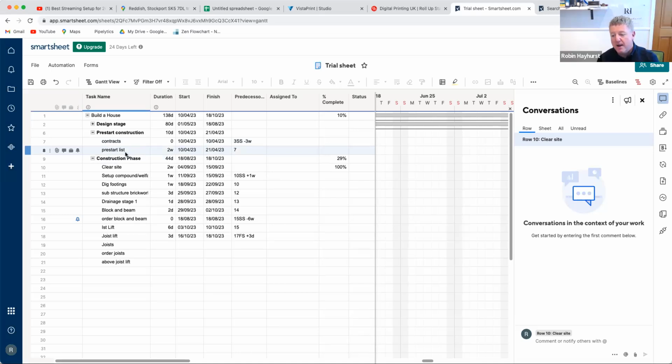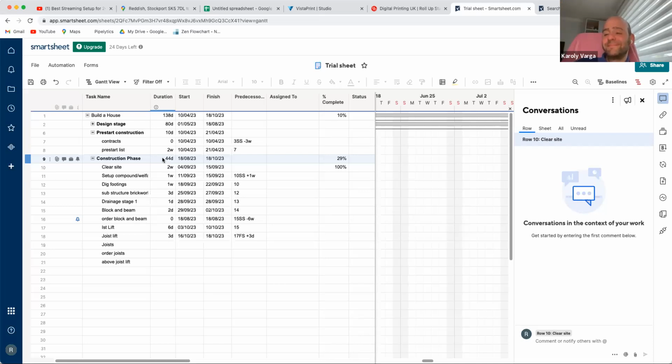This is a real bad thing that builders do: they phone an electrician and say, I need a sparky tomorrow, and they haven't given them any time. Often I hear this phrase, yeah, I'll just go into the freezer and defrost one for you, it'll be ready tomorrow. That's not the way to run a site. You've got to give a week's notice, and make sure that you understand what you're doing.